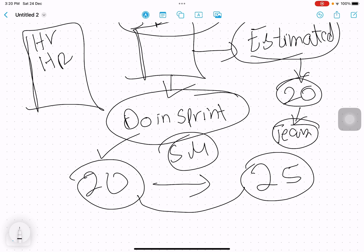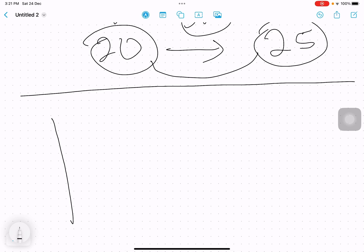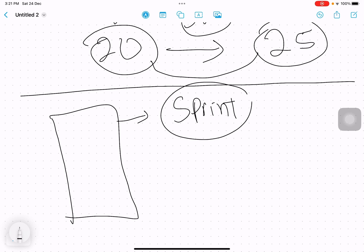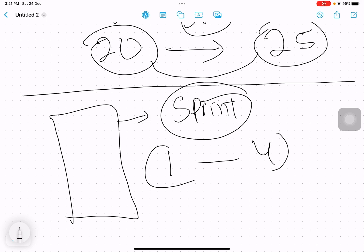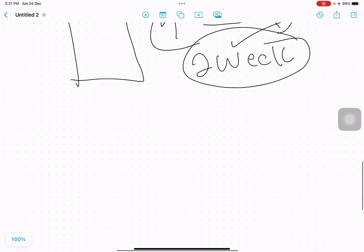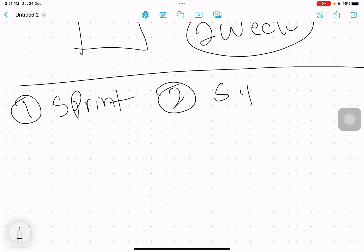Most of the time we go with what the team says, or we reach a midpoint — that becomes the estimated velocity. We select the high-value, high-priority user stories and put them into the sprint backlog. Once the sprint backlog is made, we show it to the client along with the sprint goal. If it gets approved, which it normally does, the sprint starts. A sprint is one to four weeks in duration; normally it's two weeks, as the IT sector typically uses two-week sprints.